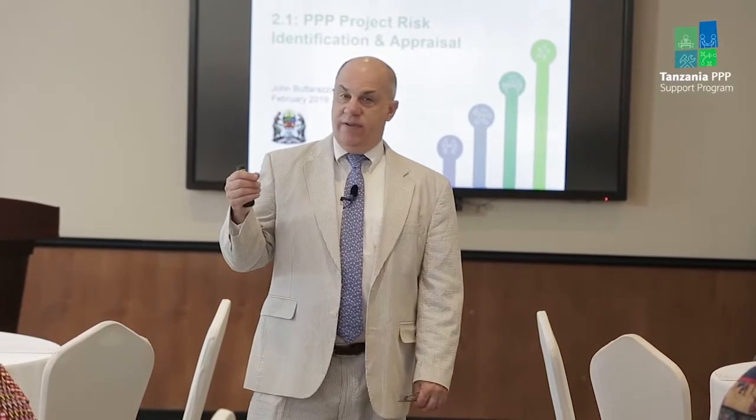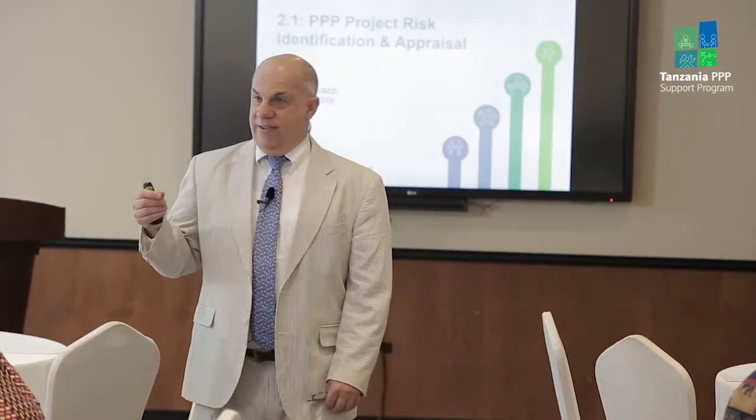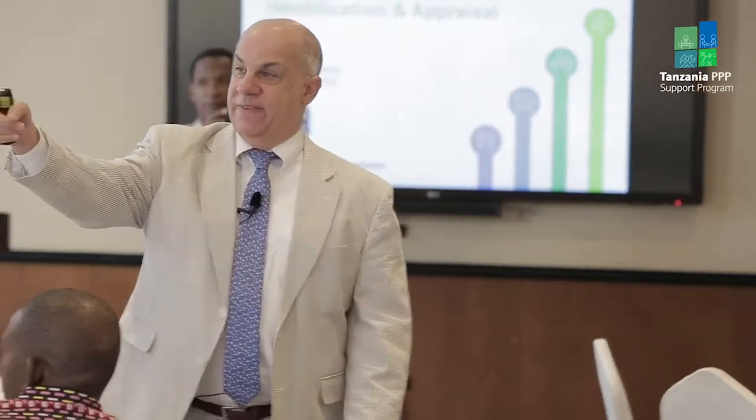So net present value, if a project's feasible, is it negative or positive? Positive. Internal rate of return is the discount rate which produces an NPV equal to 0. If the project's feasible, the internal rate of return should be greater than the discount rate, right?